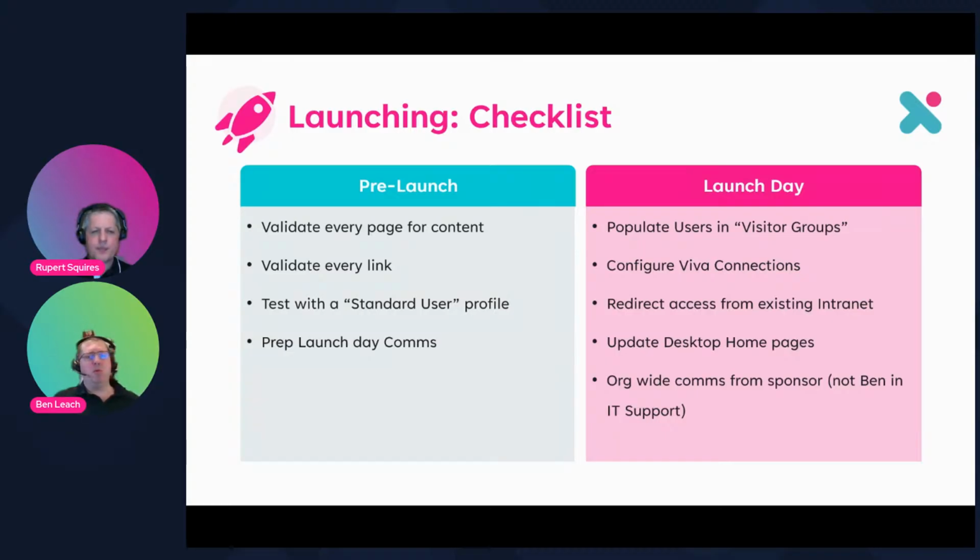But once you reach that point, and we're talking 1 or 2 weeks away from the actual launch date, one of the key things we need to do is go through and validate every page on that intranet. Go through each page, make sure it's looking good. There's no big bits of white space other than what SharePoint already provides. Everything looks like it holds together. Click on every link and make sure that there aren't any dead links that people forgot to fill in because they didn't have time.